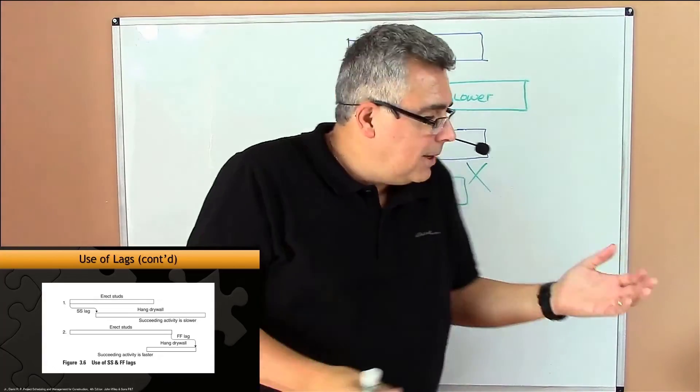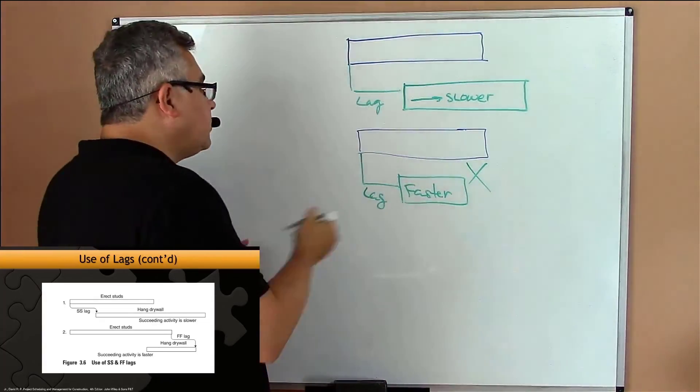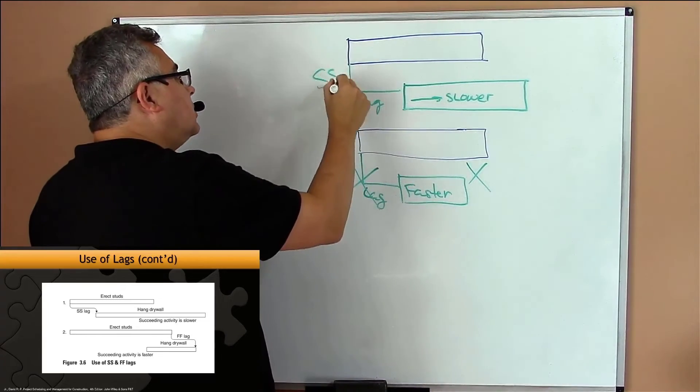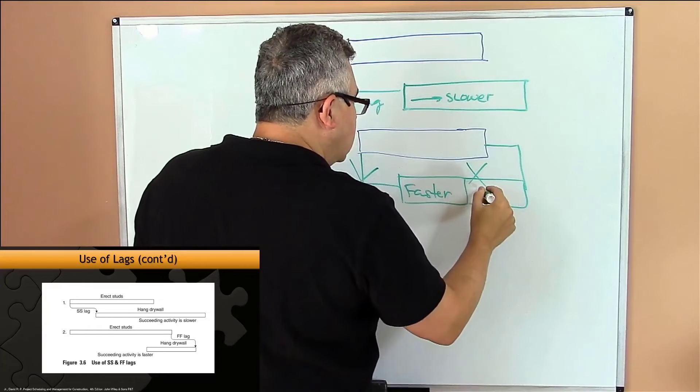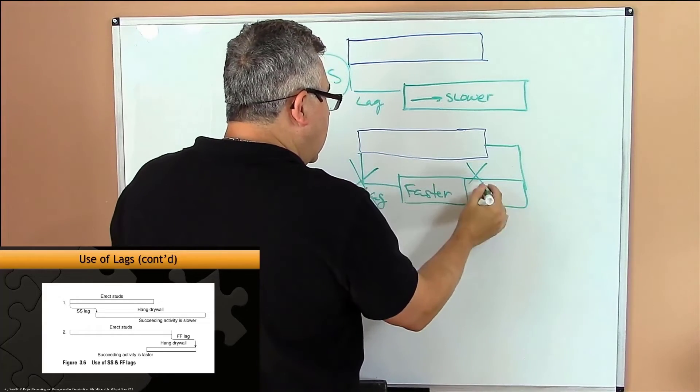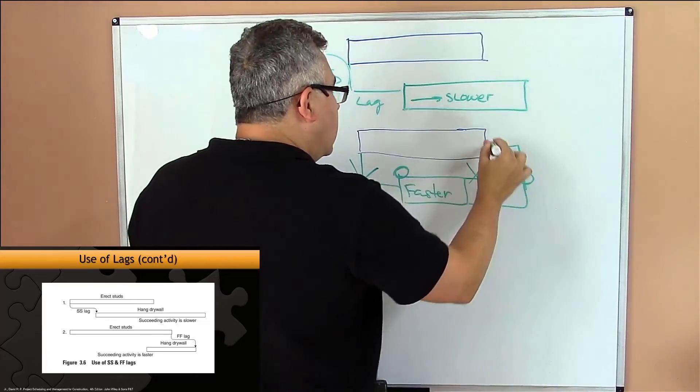And that doesn't work. So when the second activity is faster, we don't use start-to-start. We use finish-to-finish.